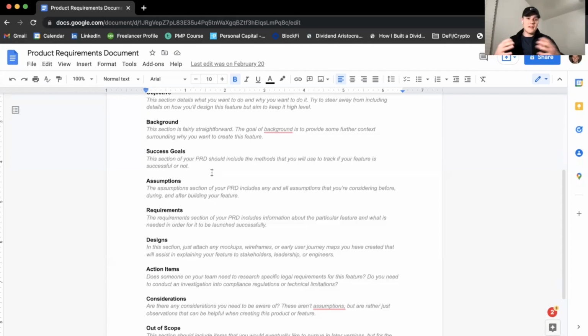There's another way of, hey, a success goal. We would like 10 million downloads in the first 3 years of our launch. That is a success goal, because right there you're proving the app is downloaded. So those are some examples of success goals. They want to be SMART, right? You want to have them measurable, testable, around a particular time constraint or time field, and you want to make sure that you keep those in mind as you're building your feature.